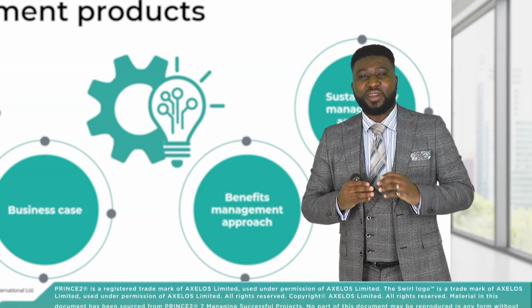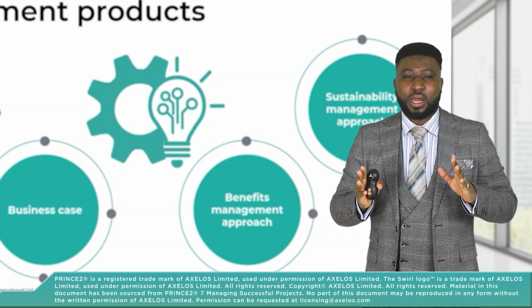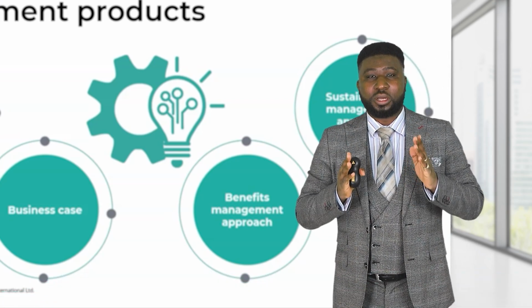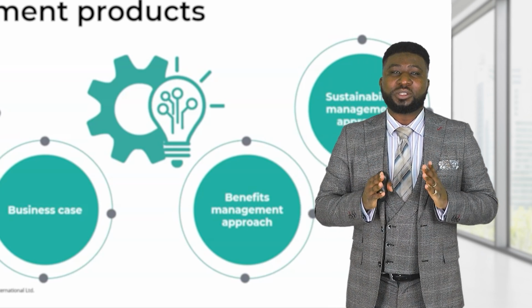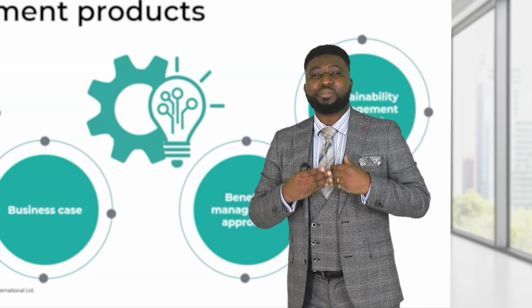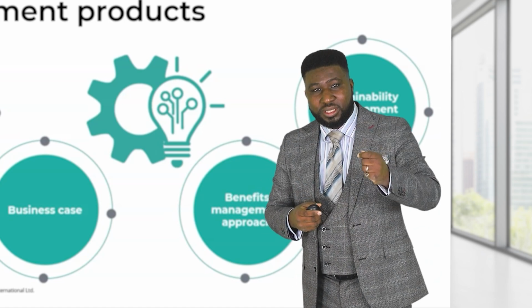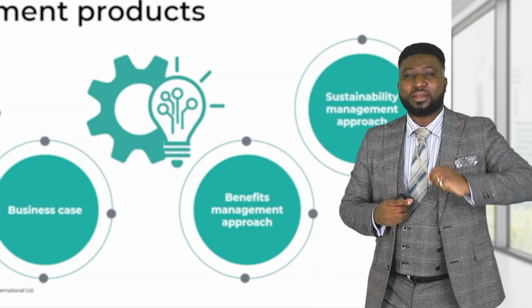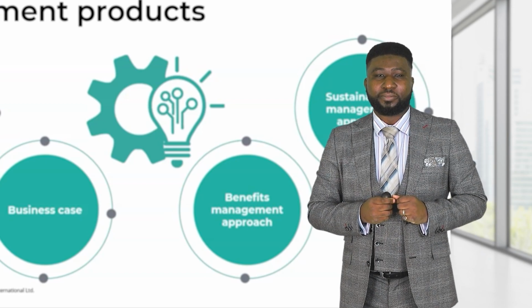Once the project is finished and all the other documents are closed and archived, the benefit management approach is not closed. The benefit management approach is going to be attached to the output, and it will go into business as usual so that they can use it to actually get the benefits that were promised in the business case.